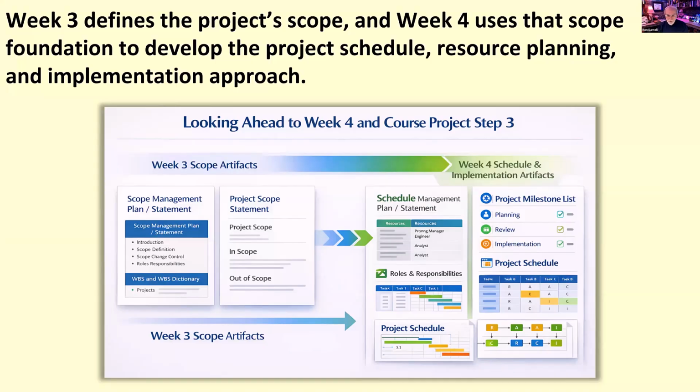There's a couple of ways we can do that. One's called a RACI chart, and the other one's called a RAM, a responsibility assignment matrix, and the project schedule. The schedule can include identification of the critical path. If you have access to a scheduling tool, that's great. Or you can use a spreadsheet, or you can list the schedule out in a table format. You'll see that work breakdown structure. The difference is you're going to be adding what has to be done first and what has to be done next to identify that critical path.